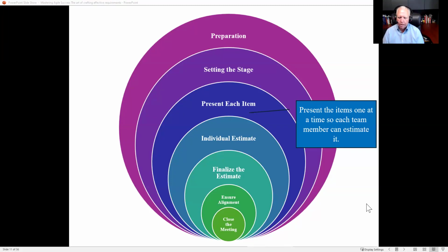So the estimation in Agile is coming from the team, not from the product owner. And so the team is looking to see, can they do this amount of work in that estimated time for that one sprint. Now you'll notice I keep coming back to one sprint, and the reason is because we're not supposed to be trying to carry stuff over to other sprints. And I'm going back to what's in the perfect world as well.